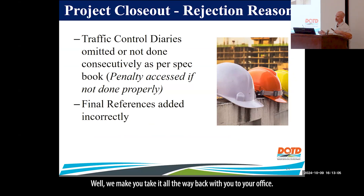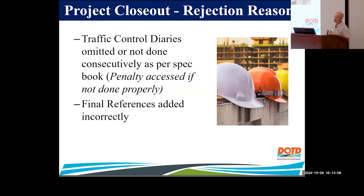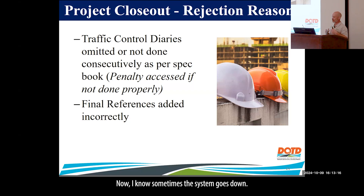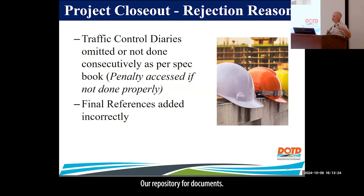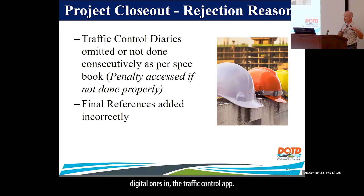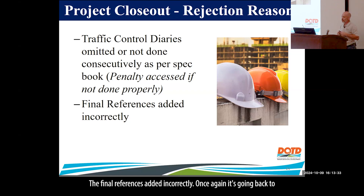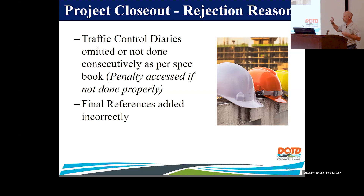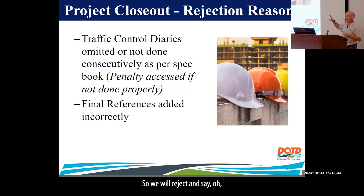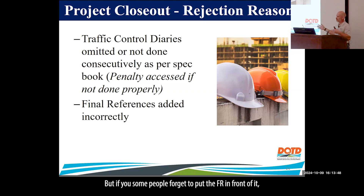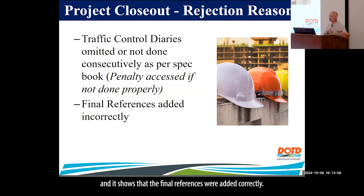Why would we reject your project? Traffic control logs were omitted or not done. If the system goes down and you have to do paper logs, those should be scanned into FileNet. If there are no digital ones in the traffic control app, we will check FileNet. Also: the final reference is added incorrectly. If it doesn't have that FR prefix, we cannot see that the final references were done and will reject it. Make sure you put the FR in front of it so Site Manager picks it up.